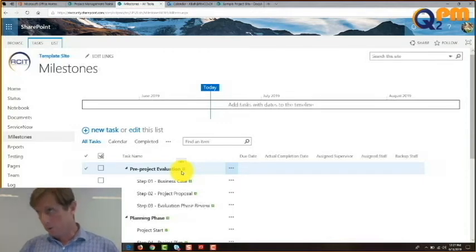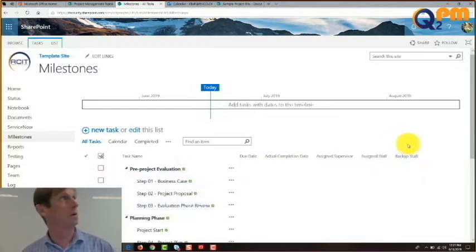Well, we want to know three things about Lyle. We want to know who Lyle is. We also want to know if there's a backup. Like, what if Lyle is sick? What if Lyle quits? What if Lyle, whatever, spent too much time with the band the last night and is just incapacitated, right? Okay, so we always want a backup.